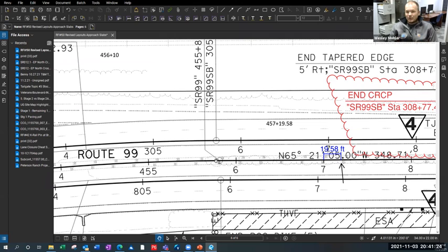How much space you have to work. In commercial, it's maybe not as big of a deal as far as the work goes, because most of it, you bring the materials up to your level where you're at, and then you just work inside the building. But I mean, you guys use it for layouts, right? For laying out materials and logistics plans in your yard, but for work like this, you have very limited room, but you have really big equipment. So you have to take that into consideration in your production rates when you're bidding.